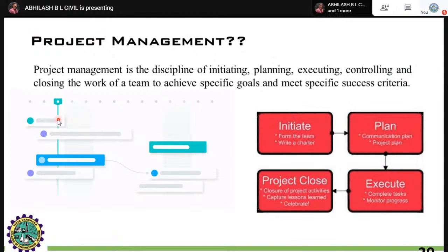what's next, right? You can just observe masonry wall. Simultaneously, you can give some activities like finishing of the floors or bathroom closets, water fixtures. Like this, you can make activities along with this particular thing. Whereas you can see this particular rectangular section: after the completion of the second activity itself, you have to go for this activity.